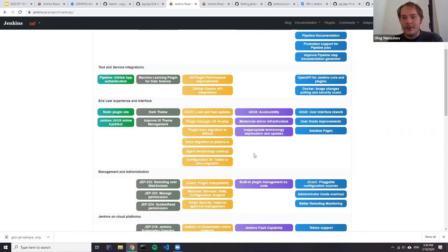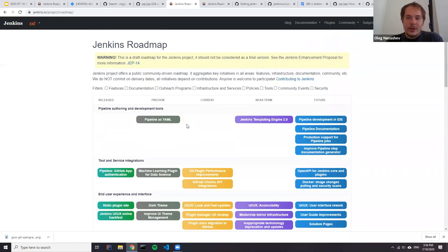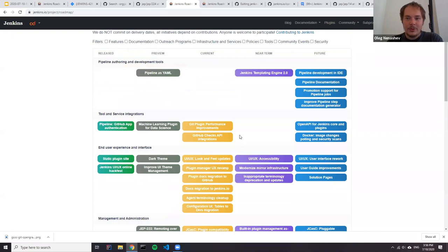On the link you can find information, and this might be different. It doesn't have to be Jira. If you want to use Jira, my recommendation would be to use Epics, because these initiatives are usually quite big, which means that there are multiple deliverables. In such a case, I would recommend using Epics. We don't have support for other kinds of grouping in Jira. So if you want an Epic of Epics or something like that, we don't support that in Jenkins Jira, but at least some grouping you can achieve.